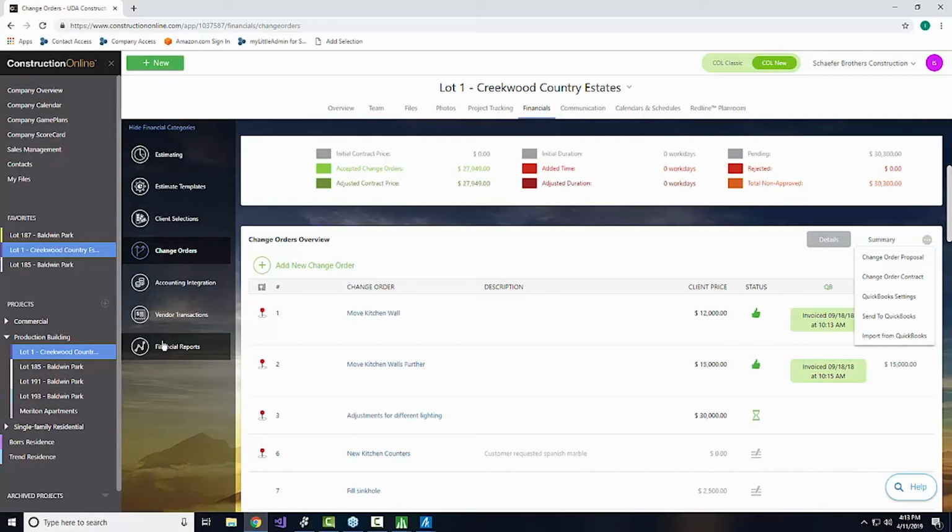And then number four, looking at the reporting tools like the WIP report, that also needs to be done on a regular basis, and share it with the people who are most impacted by the cost of the jobs. So if it's going to be your bookkeepers or your project managers or your sales team, they need to know they're selling the right jobs. You need to figure out if those are the right jobs, and with tools like the WIP report, you can find that very, very quickly.